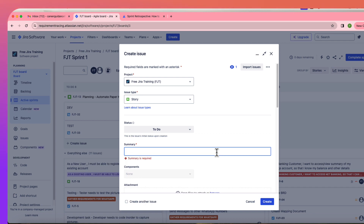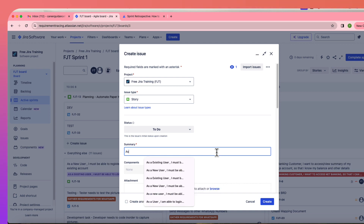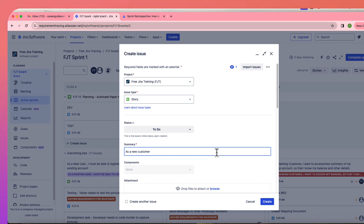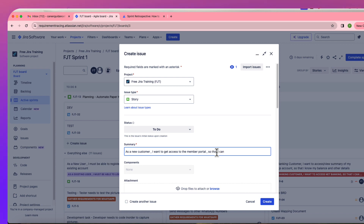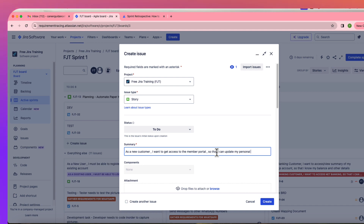You always write user stories as if you are the end user. For example, you are creating a login page: you can say, 'As a new customer, I want to get access to the member portal so that I can update my personal information.' User stories are always written from the perspective of the end user or customer.